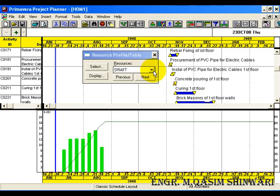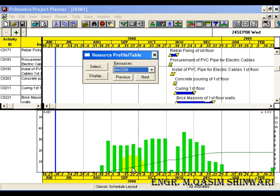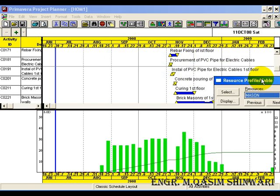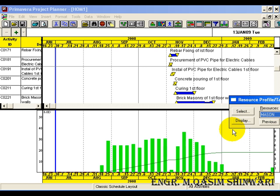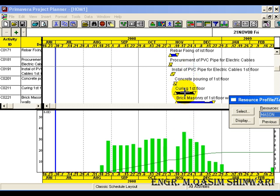Similarly, you can click here. So for different resources, you can observe the different kinds of graphs. For example, if in case we have some lack of resources and this histogram changes to red, then trace this histogram and see which activity it lies here and try to change the duration. Or if you have more resources, then add the resources and see the changes. This is known as resource profile leveling.